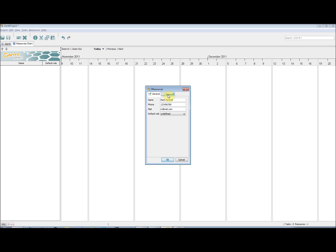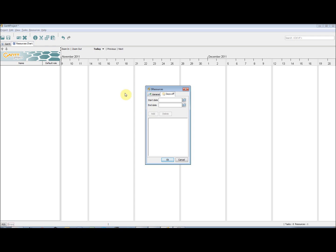You will notice that there are two tabs, General and Days Off. If we go to Days Off, we are able to insert holidays for this resource. These will show as holidays on the calendar and will not be worked on by the resource.